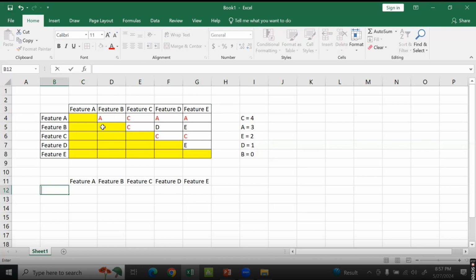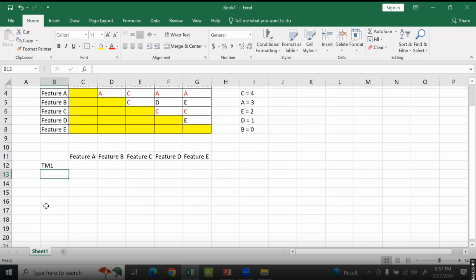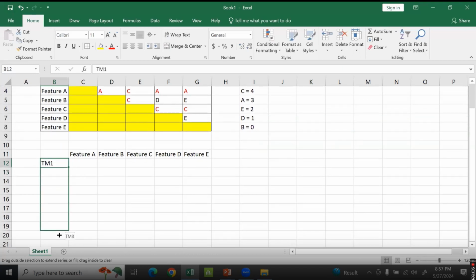And we got team members. So we got team member 1 and so on and so forth. We got multiple team members. And what we do in 100 points method, let's say we have 8 team members. In the 100 points method, every member has been given 100 points. And they can distribute these 100 points as per their understanding based on what they feel is right. So there's no condition. I can go and put all 100 points in one of the features. If I strongly believe, which is where I feel it's not too good, because it gives the liberty to the person that if I strongly believe D is most important, I can put all 100 points for D, which ideally is not the right way, but again, that's how it's allowed.